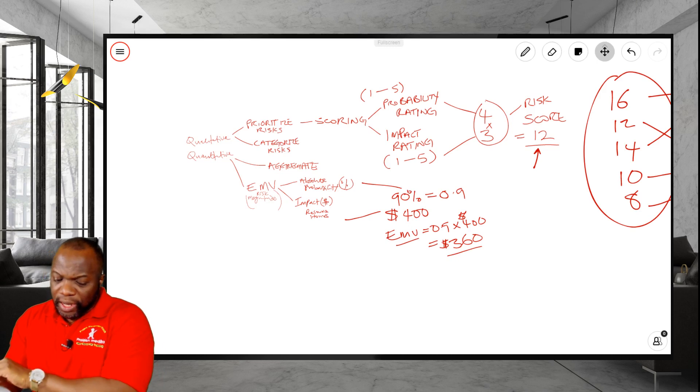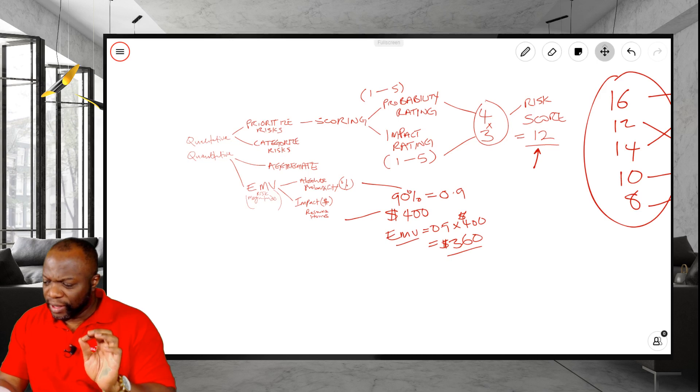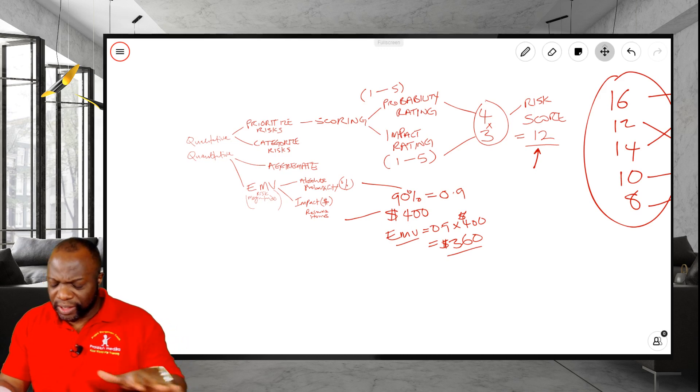The key benefit of this process is that it quantifies overall project risk exposure. It's a powerful word. It's not just thrown out for multiplying random numbers on a scale. No. It is used with this in mind, probability and impact in dollars and absolute probability in percent. And if you take a look at the tools that we use here, they're very numeric. They're very, very specific to dollars, percentages, absolutes. No scales, none of that.